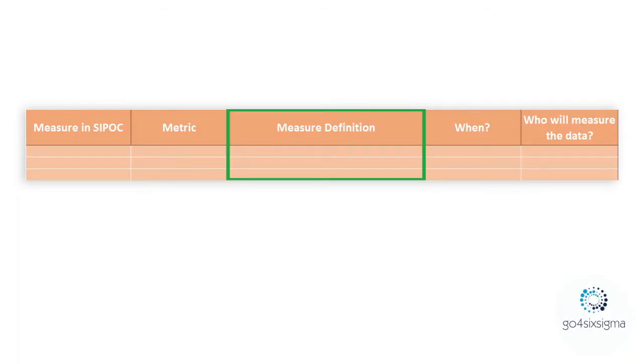The next column is the measure definition, which provides more detailed information about what you are going to measure. For example, if the metric is time spent per one pizza preparation, the measure definition would be: how much time is spent to prepare one pizza in restaurant A during a specific period — for example, in January. Be very specific in your measure definition so you are certain what kind of data you are looking for.